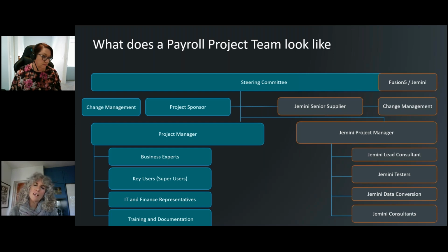Now, you may be looking at this and going, there's a group of people missing from this, and this is our employees. So in this project process, we are assuming that it's a train the trainer perspective. So your key users, your business experts, will be trained enough in the application to train your end users. And that really helps the change management within your organisation too, because they're buying into it being trained by your company and they're seeing how you've adopted that solution.